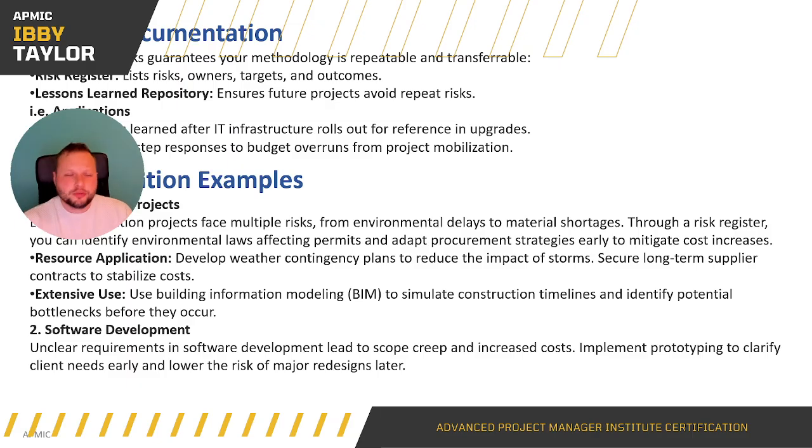Documentation. Most projects will have a risk register, which is a list of risks that you've identified, who's responsible for it, so who's in charge of the mitigation of that risk, or the avoidance, or the acceptance, and the targets and outcomes. What are you looking to do about it? What outcome do you expect to see? And what scores do those risks have attached to them? And then a lessons learned document, so ensure future projects avoid repeat risks.